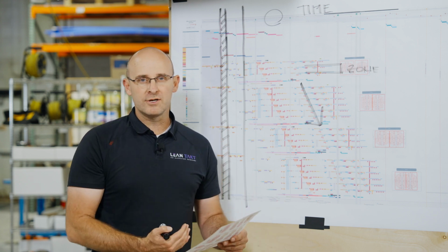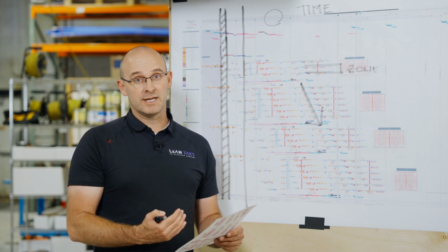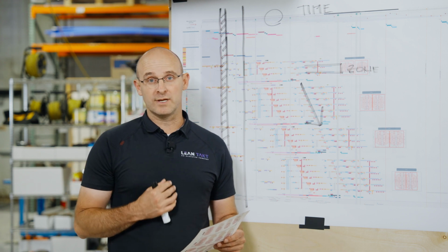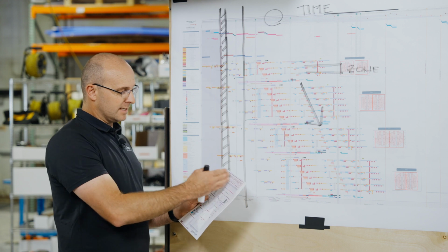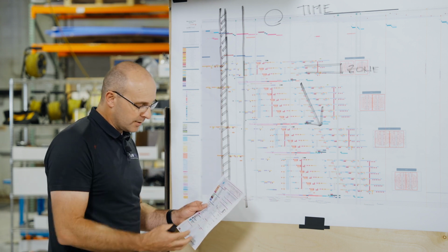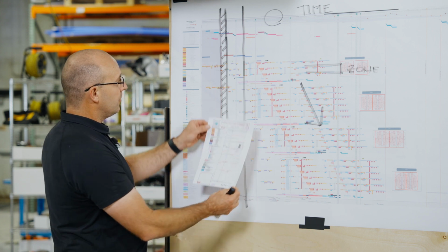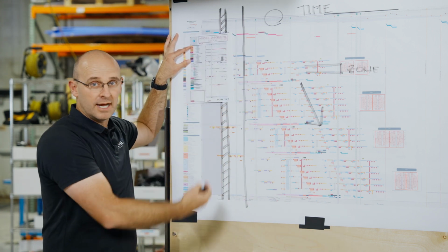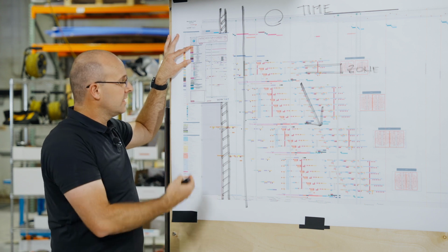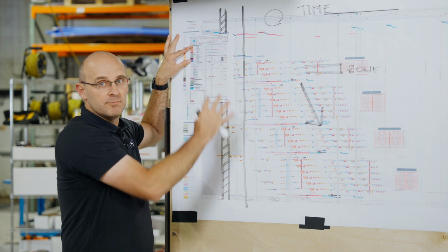And they make minor adjustments that are then communicated in the weekly work planning meeting, or what I call the Trade Partner Weekly Tactical. And so then they make commitments because they've collaborated, because we respect them, and this is a part of the last planner system. But now we don't have them waste hours upon hours creating pull plans and weekly work plans from scratch. It comes from something they already made.